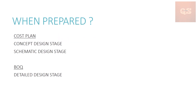Let's understand when both these are prepared. A cost plan is prepared during the initial stages of a project — that is the concept design stage or schematic design stage. During these stages there will not be much documents or drawings available; mostly some reports and master plans are available. From these, as a cost manager or QS, you have to prepare the cost plan to arrive at the budget of the project.